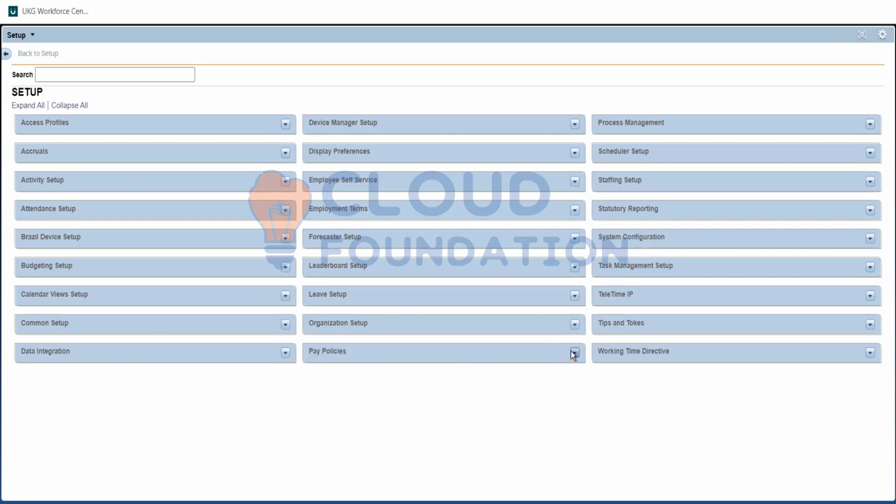Apart from that, for all other pay policies and other things, say you have maybe 2,000 employees per subcompany. It will approximately take 6 to 8 months to implement Kronos for them, and you might need at least one resource to support from the Kronos end and 3 Kronos resources at your end. If it is 2,000 to 3,000 employees, you need to implement within a 6 to 8 month time period, and you might need 3 Kronos resources at your end.